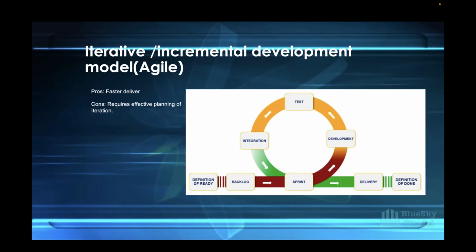So agile promotes customer satisfaction. It focuses on delivering working software frequently, ensuring that customer feedback is also incorporated early, because once you demo it, any feedback that comes will go back into the next sprint. So whatever the outcome is, you have to bring it into the next sprint. Okay, this is what we are meant to do based on the feedback that we got.